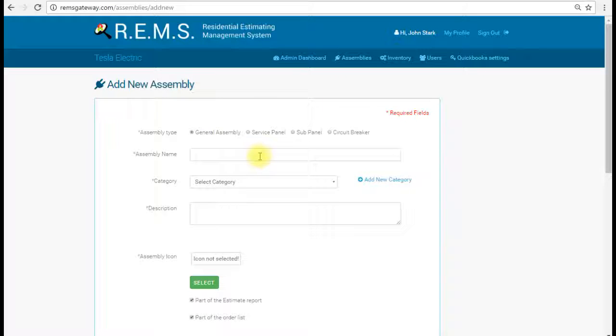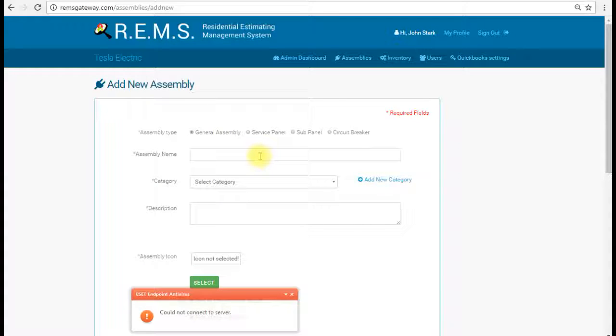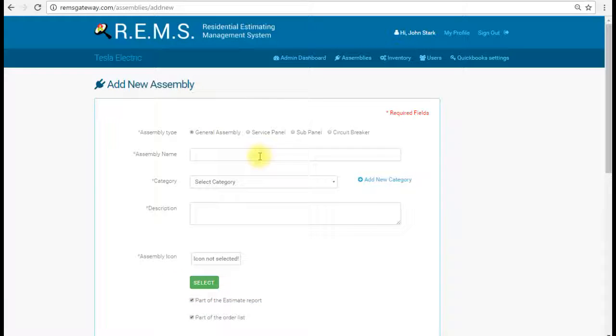So what we've done is we build a switch assembly that omits the plate and the box for all of our different style switches. Then we come back after we've put all of our switches together in Editor, and we place a plate cover next to those switches that will allow us to correct it. Say we put 3 of them together, we would pick a 3-port plate, and that would include the plate and the box. So that's how we correct our switches.